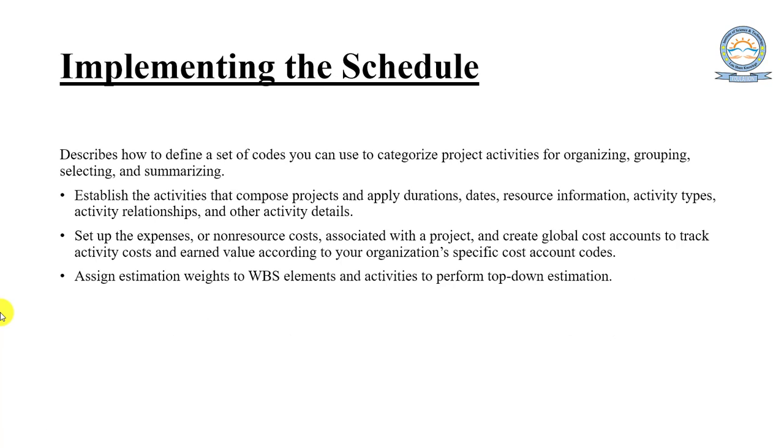Third, we will implement the schedule. Implementing the schedule describes how to define a set of codes you can use to categorize project activities for organizing, grouping, selecting, and summarizing. Establish the activities that compose the project and apply durations, dates, resource information, activity types, activity relationships,